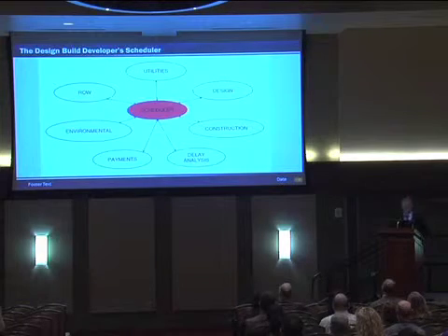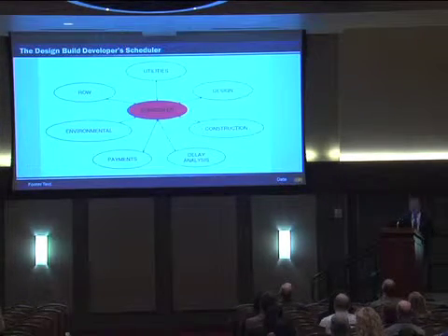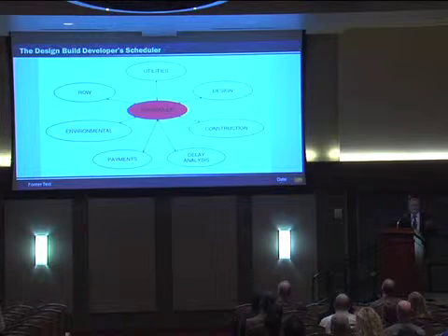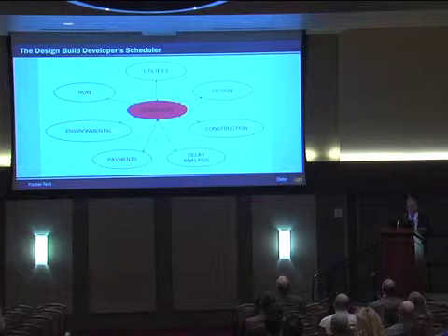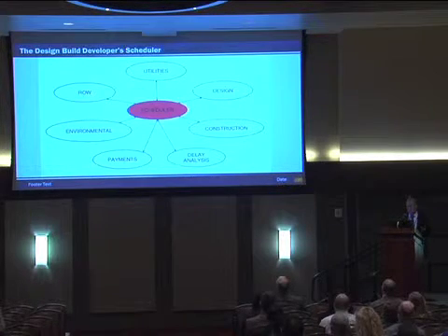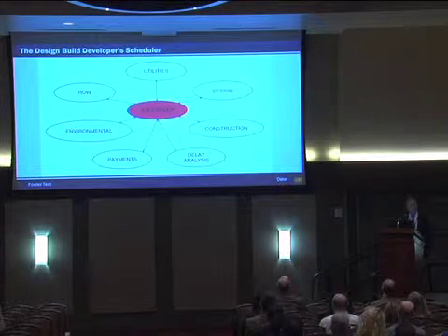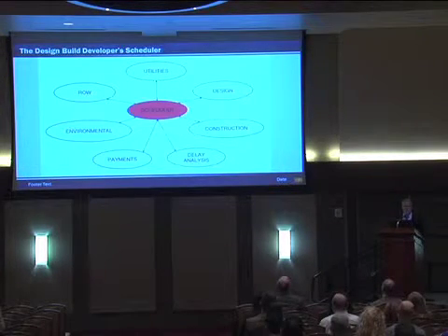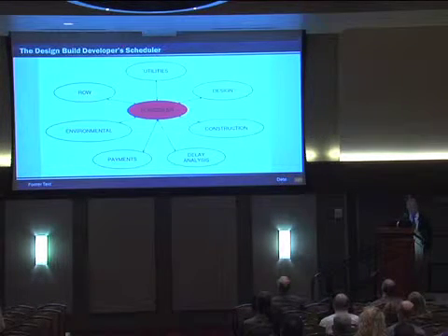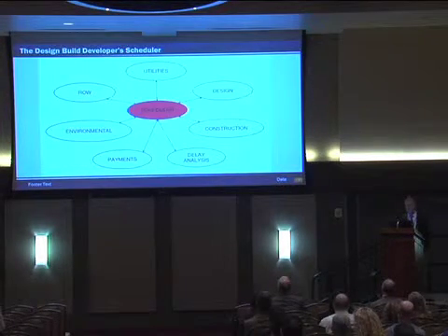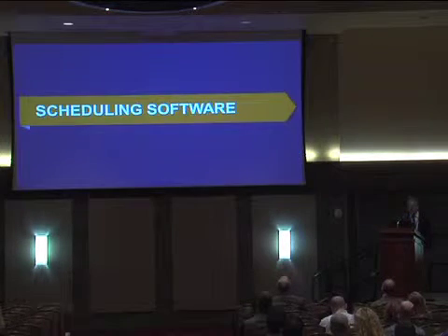So let me just illustrate that. In design build, such as the Grand Parkway project I'm on, the scheduler is the center of attention. They've got the right-of-way in there, utilities, design, construction, environmental. It's a cost-loaded schedule, so the payments come off of the schedule. It's really a lot of pressure on the schedule, and it's really raised the bar in terms of what kind of scheduling folks have to do. And then there's the delay analysis.